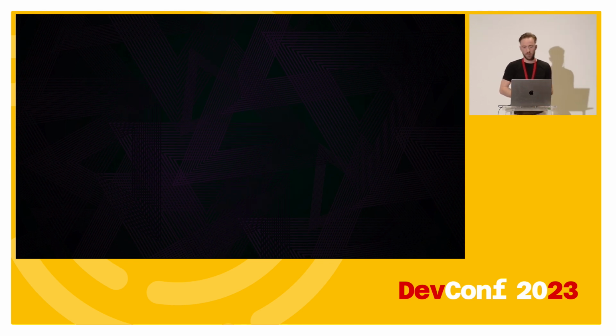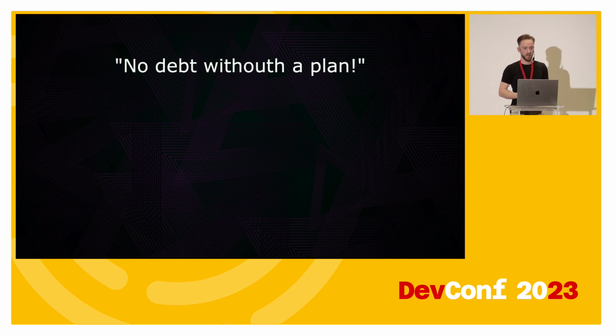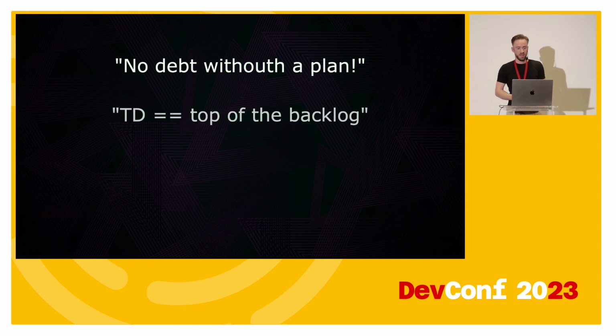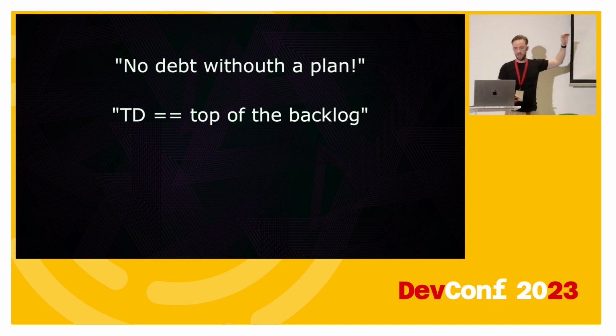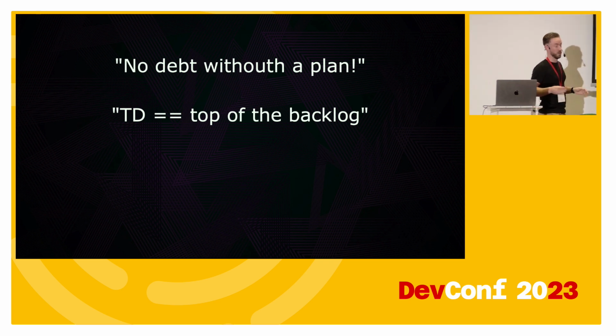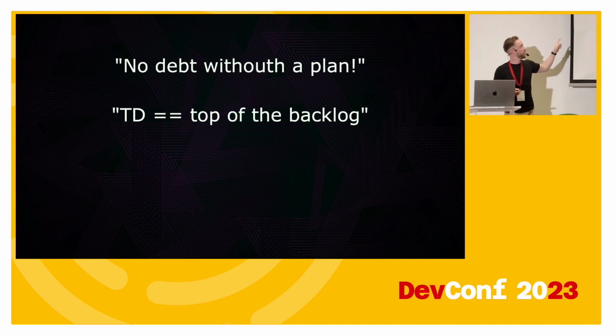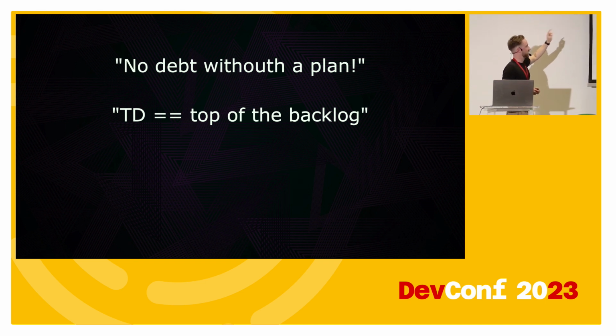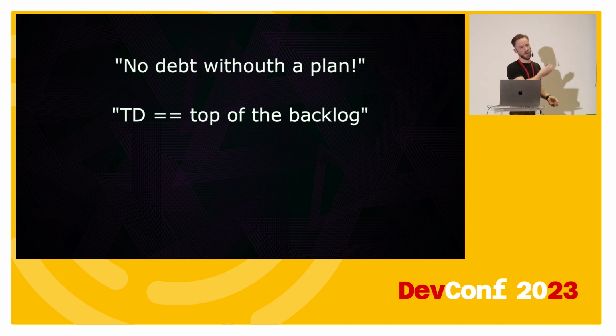So when you go home, I hope you remember a couple of things. Please don't take on debt without a plan. Said it before. And a good plan, preferably. Make a calculation. Make sure that you know what you need to pay back and how you're going to do that. Another great tip: technical debt goes to the top of the backlog. That's a bit of a controversial statement, but I've applied that, and if you at some point have an acceptable amount of technical debt, this is what you do every sprint. Every sprint there are technical debt issues at the top of my sprint backlog, and I get to work on them. I don't do the entire backlog. Every sprint there is technical debt.